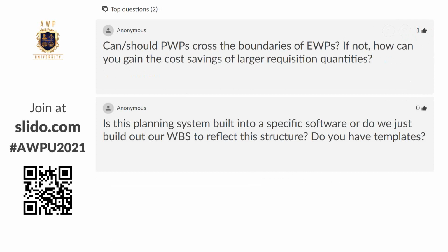But that PO for that order will be called out across multiple PWPs or one PWP towards multiple EWPs. So that's where I keep giving the caveat of a web tie, where we'd love to get one-to-one, but one-to-one is not possible, and it's more of a web tie, and we need to understand the web of logic tie and how that data affects. So we'll never get to one-to-one, but that's kind of a goal to try and make it as simple as possible, but the logic tie of what data ties to which is most important. So that's a very good exception that creates that data web rather than a one-to-one relationship.